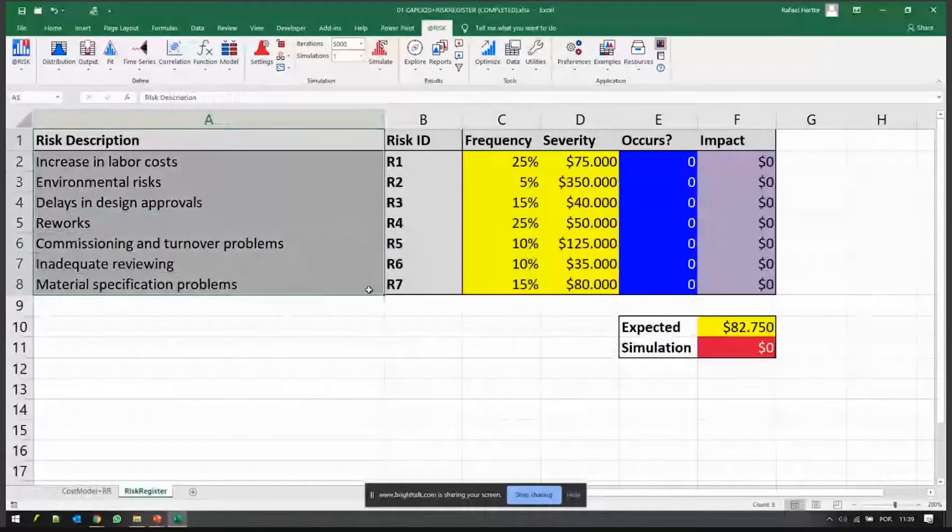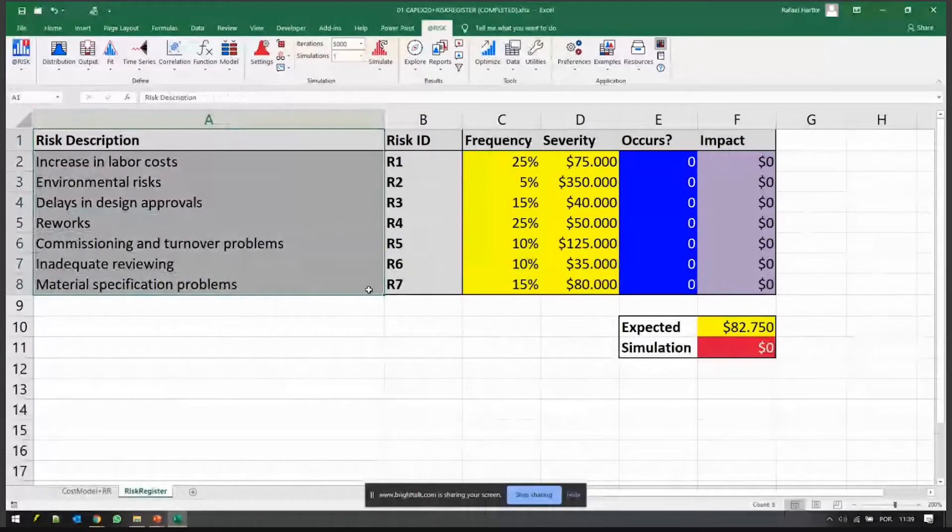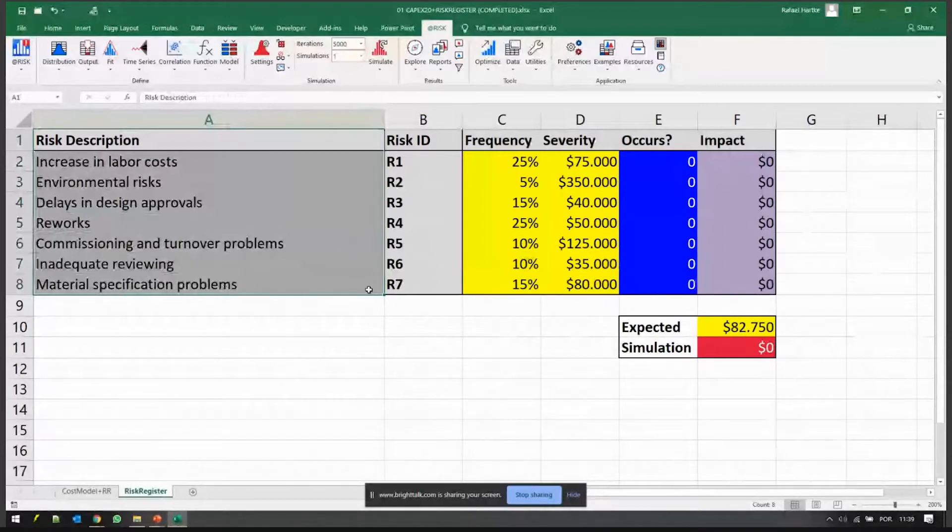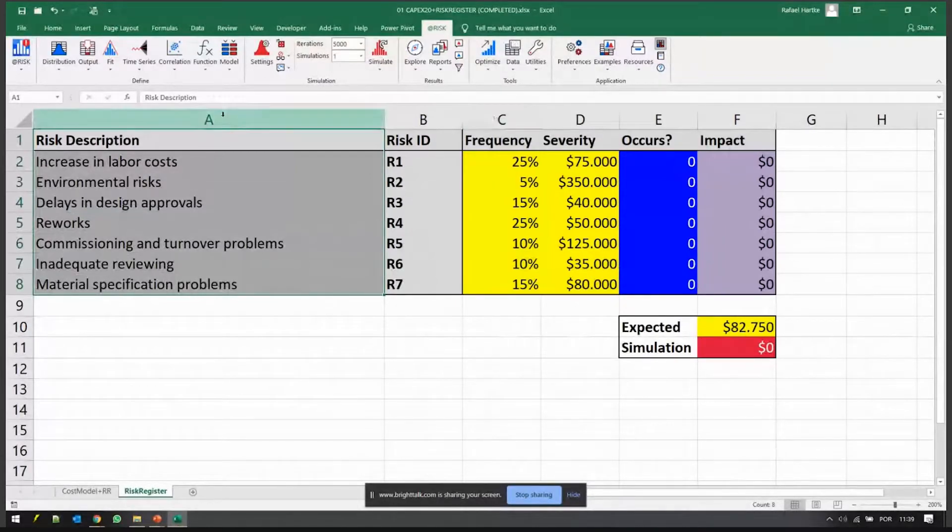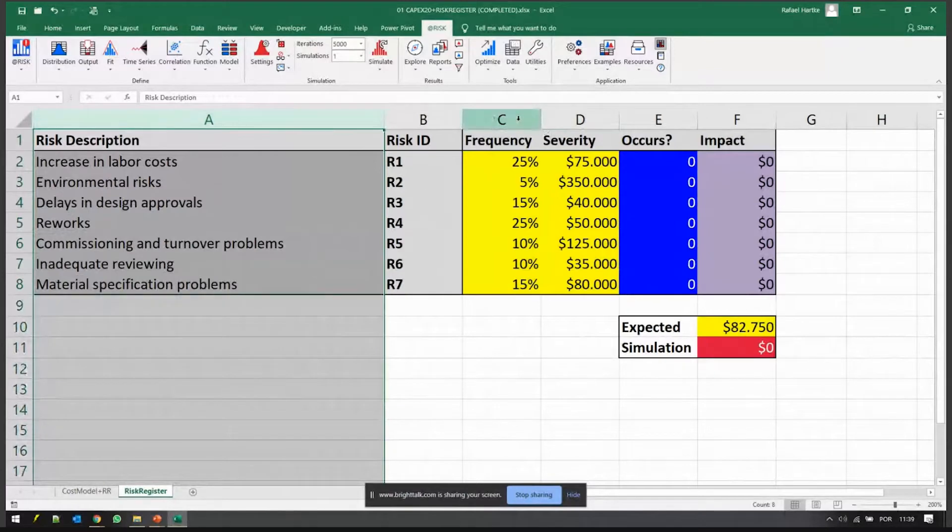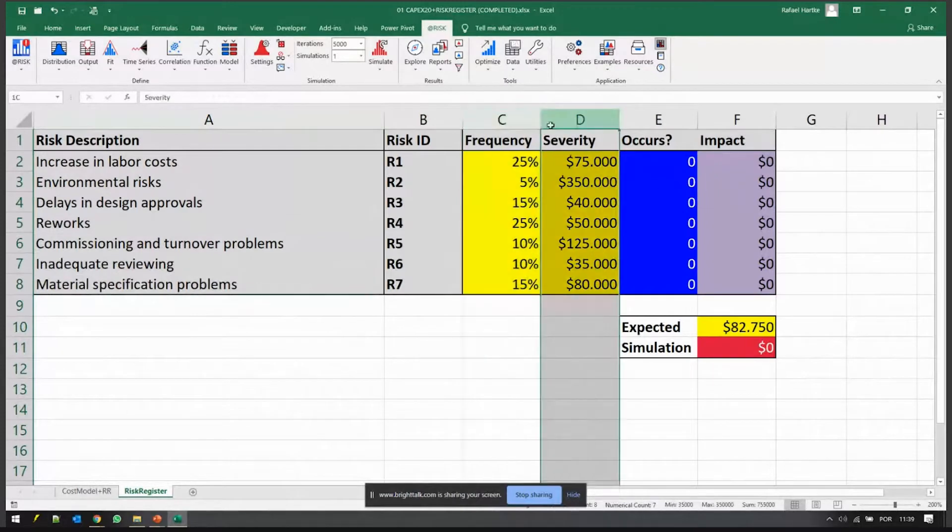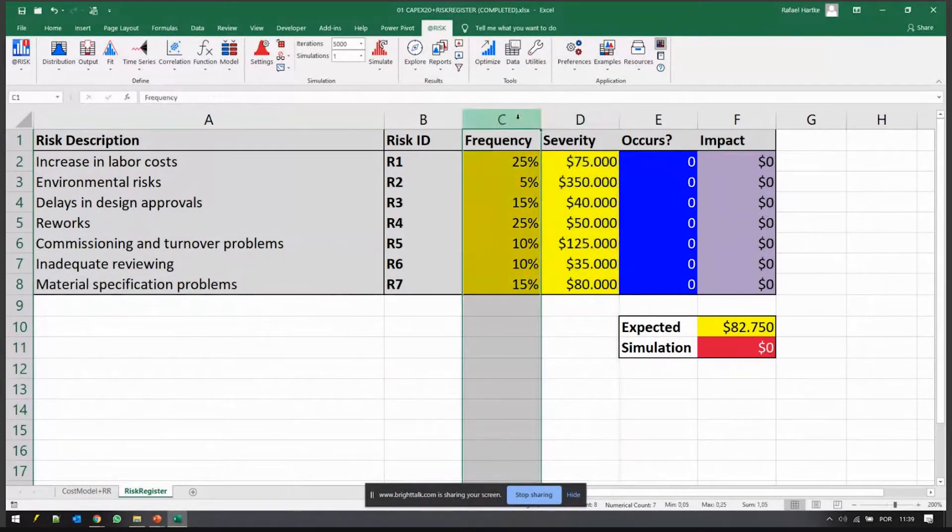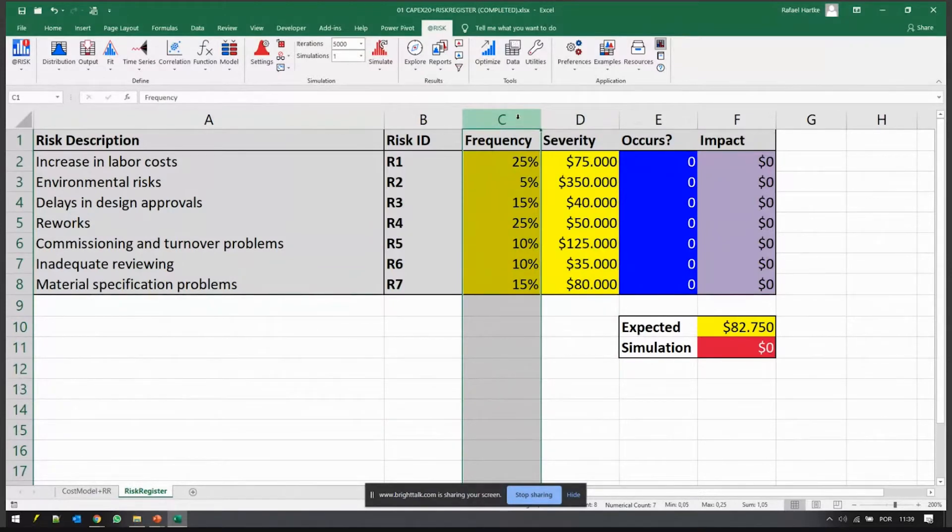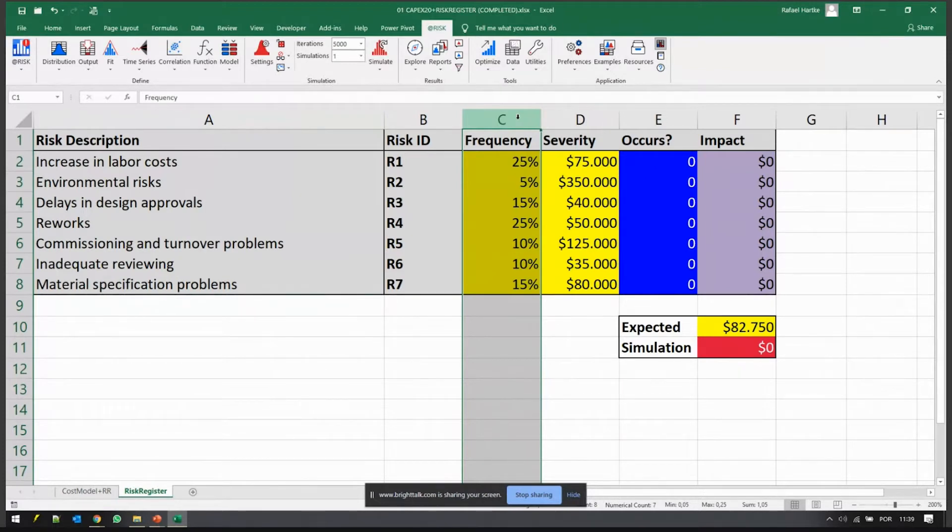These are the risks that for this project were assessed during qualitative process. There might be a heat map associated with them. For each risk there's a frequency or probability that the risk occurs or not and a severity if it does occur. Here the probabilities are quite high because I have to make the numbers pop up on screen, but usually we're talking about things that have a low probability of occurrence.